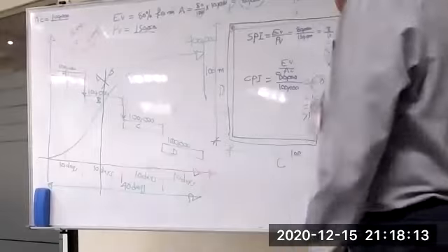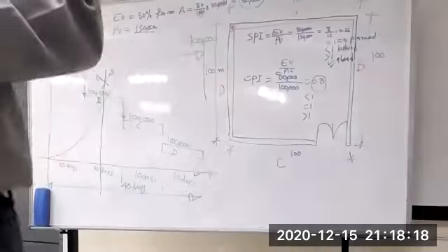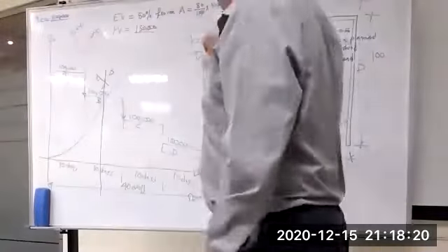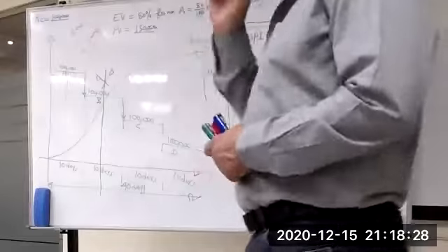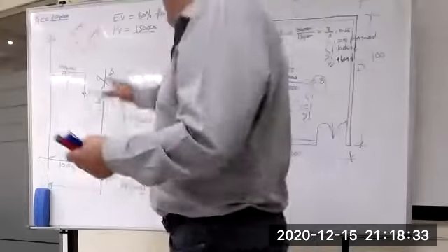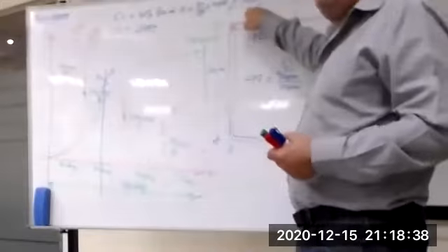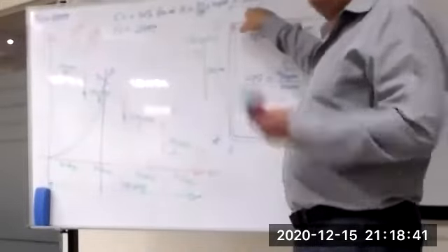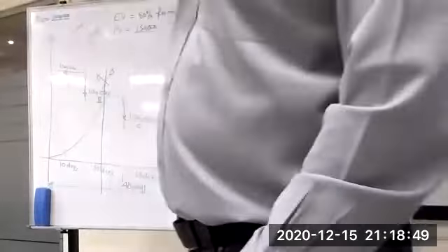Less than 1, equal 1, more than 1. What does it mean? Less than 1 means every 1 Qatar Riyal I am paying in the project, I get in front of it 0.8, meaning 80 dirhams. Every 1 Riyal I spend and get that. But now I am over budget. Now assume 1, the same. I am behind, but I already paid 80. My actual cost, my liabilities, my everything, will be 80. 80 divided by 80, okay, that's fine. I am behind schedule, but I am as planned for the cost.